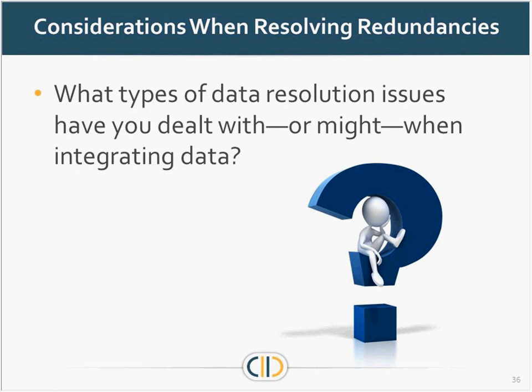One bad one was related to the dropout report. It seemed pretty straightforward. We had two collections of the dropout report. One they keyed in manually, one coming live from their student information system, with the data necessary to produce it. We decided we were going to build this and automate the whole thing. It's simple. It was element for element. We talked to the program offices there at the state. It's basic, no issue, element for element. We put the report into production.